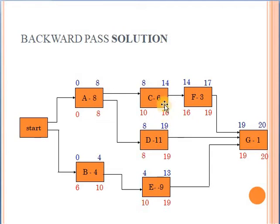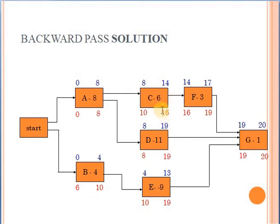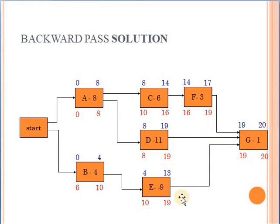The value 16 is moved to activity C. Why? Because C is the predecessor of F, and F has a latest start of 16, so I have till week 16 to finish activity C. So the latest start of C is 16 minus 6, which is 10. Regarding the other predecessors of G: for D, it's 19 minus 11, which is 8. For E, it's 19 minus 9, which is 10.